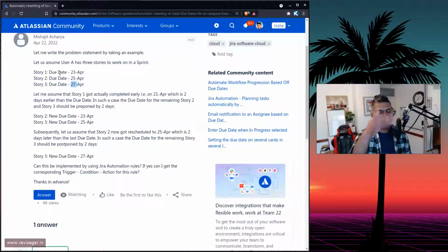You have a burn down chart where you can take a look at the progress, what is happening. Ideally, when you have a burn down chart, the line of the actual work should follow the baseline. If you see that people are not doing any work throughout the sprint, and in the last 2 days they're doing all the work and there's a dip, it means that someone is not updating Jira stories, or there was indeed no actual work happening. So these reports will show you the true picture, or what is there in Jira based on whether people are updating it or not.